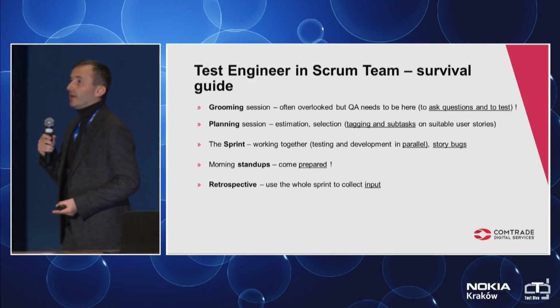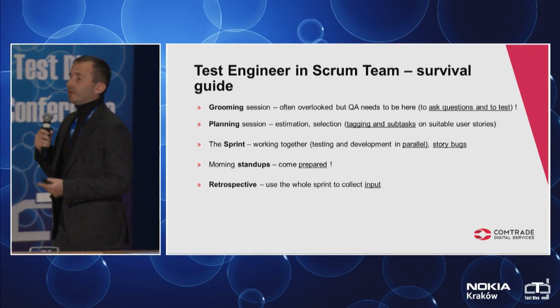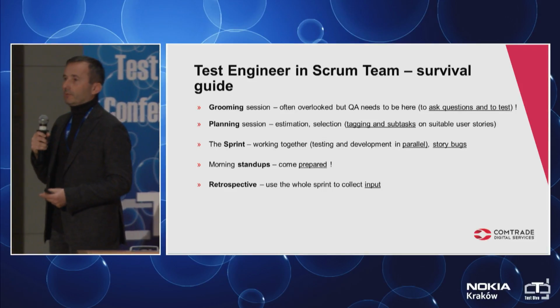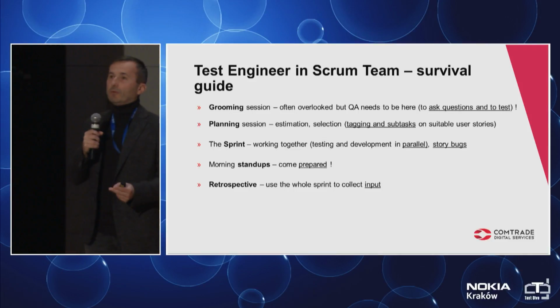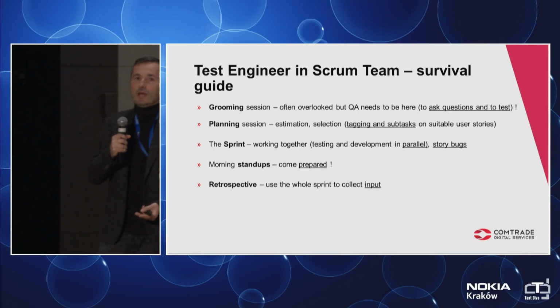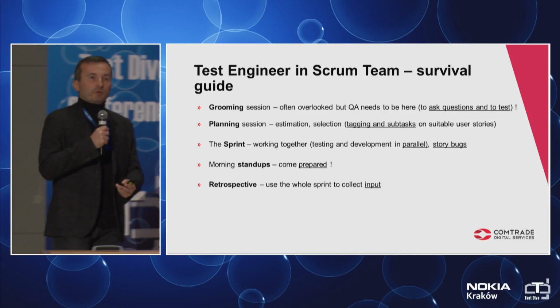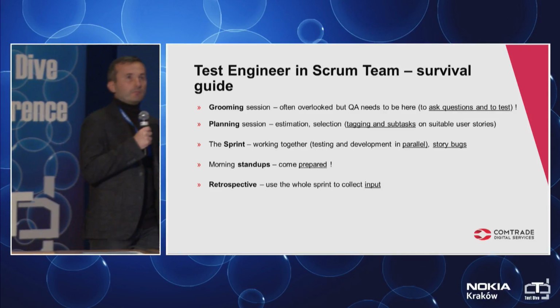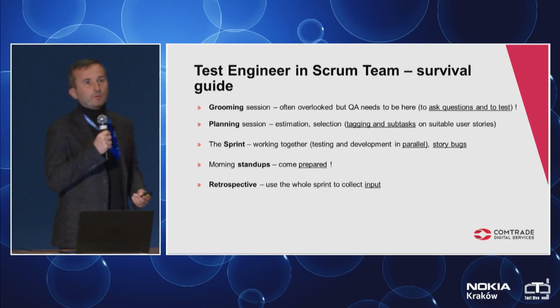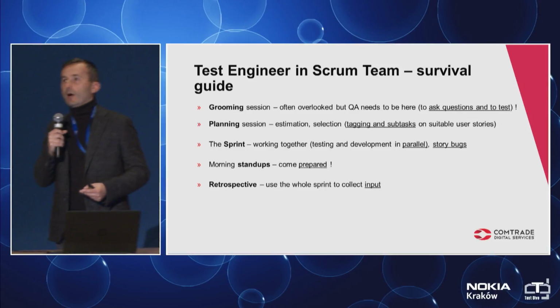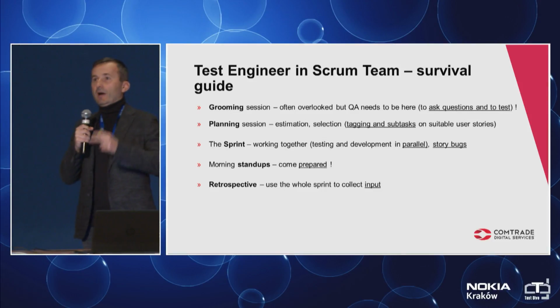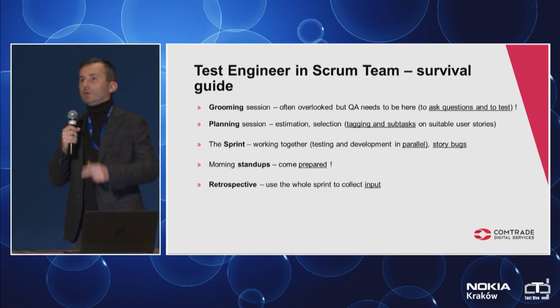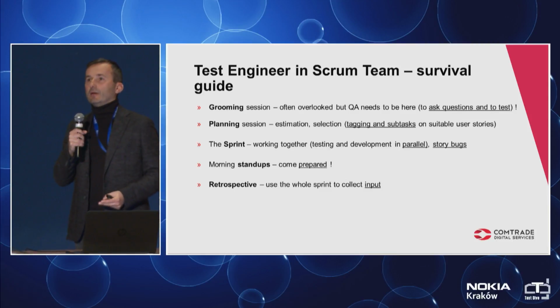Also, story bugs. You can very easily get confused about what bugs are open for some user story. Can you close the user story? Are there any open bugs? I don't know. You are possibly using different defect tracking tools, but in Jira, if you are opening bugs as technical bugs under the user story, it's an easy way to track if there's anything open under that user story.